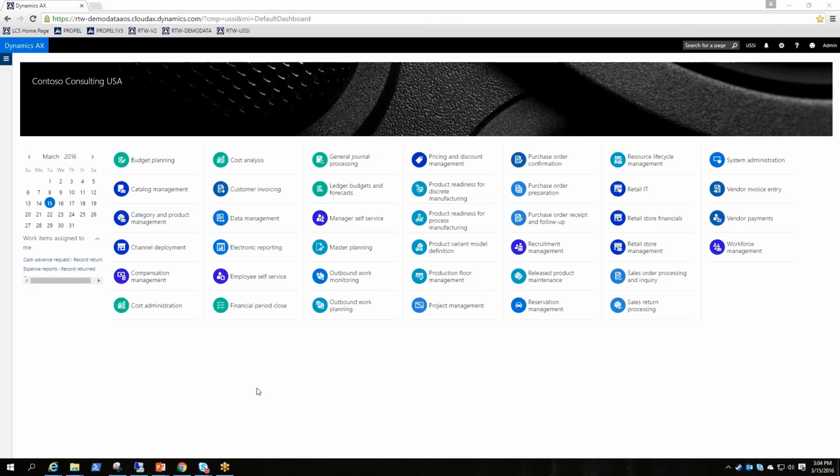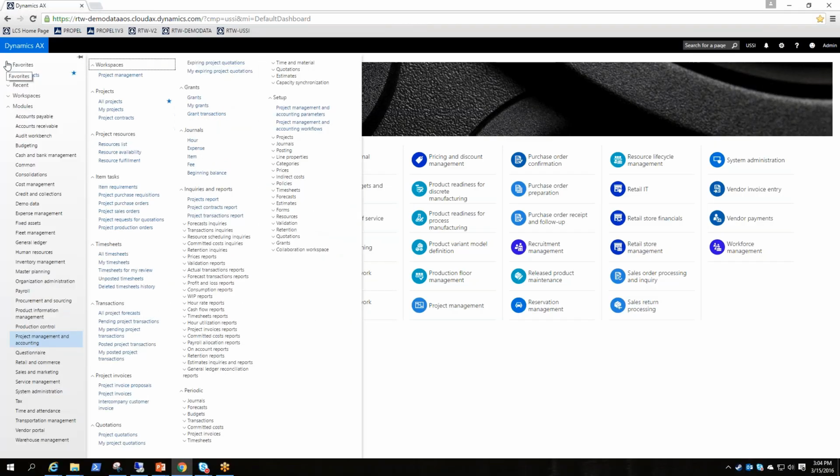All right, so we're going to go in and set up project stages. General rule of thumb when implementing, I guess, any software is you want the product to reflect how your business operates, and project stages can do that very well. But on the other hand, overthinking the scenario can cause a problem, because if you have tons of project stages and all that type of stuff, this is where you can get into a dilemma. A lot of times when the overthinking occurs, the clients that I've worked with just go back to created, in process, and finished. Those are the 3 primary ones that are used. So anyways, with that being said, let's jump in and set up some project stages.